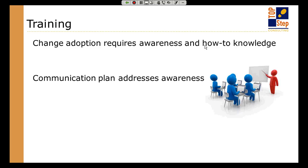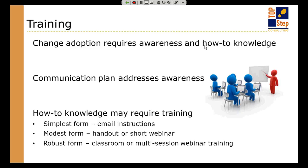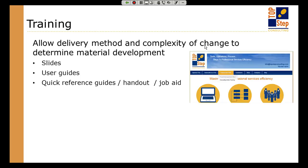The fifth area is training. Training is how people know what's happening and what they need to do. The communication plan is your awareness factor, but the training plan is how you get that knowledge to the individual — how to put a timesheet in, how to log into the system, how to update a resource schedule so that the forecast is correct. The format of training really depends on the volume and complexity of the material: an email could be sufficient, but others could require a full day or two-day classroom with exercises to ensure people are actually adopting the change.